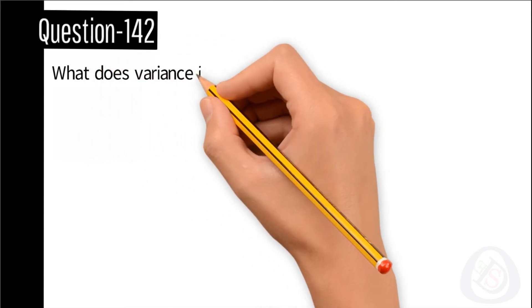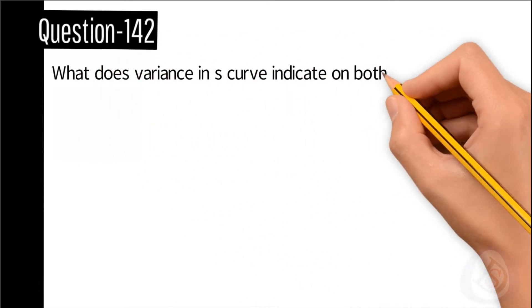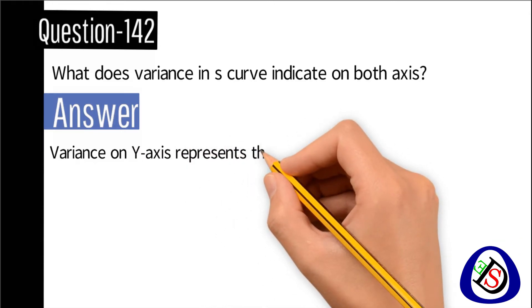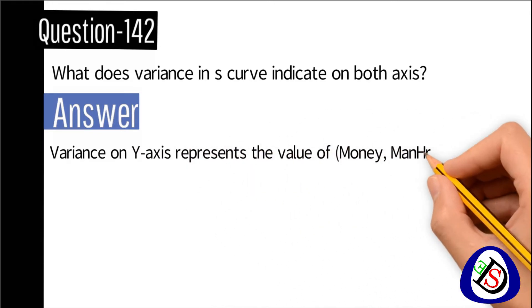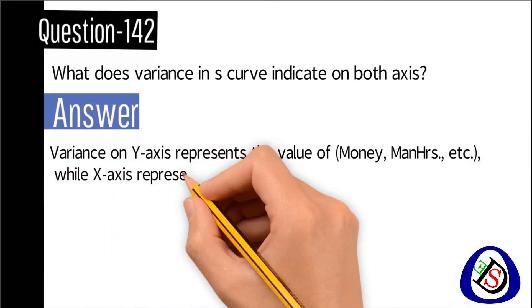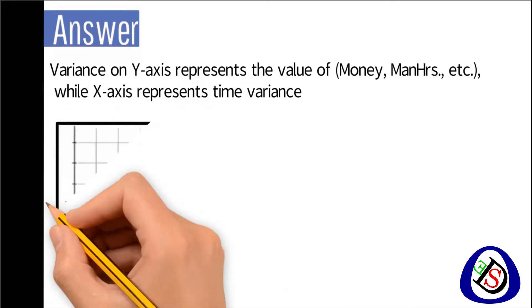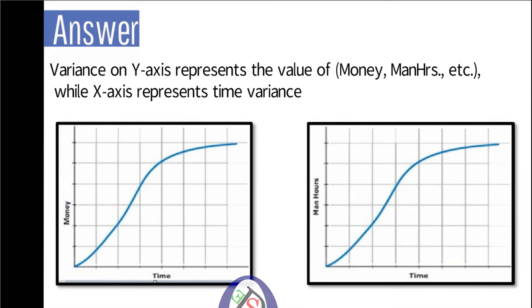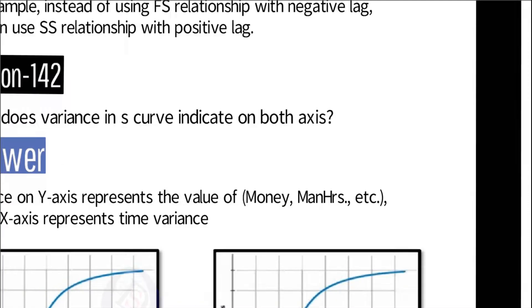Question number 142: What does variance in S curve indicate on both axes? Answer: Variance on y-axis represents the value of money, man hour, etc., while x-axis represents time variance. You can see in the first graph time and money comparison, and in the second graph time and man hour comparison.